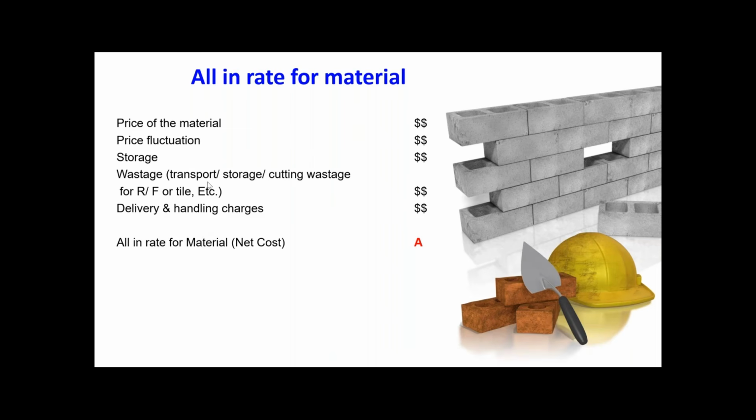So do you understand? Maybe you are paying the tax, okay, that should be included within that one. If you are paying any other cost to obtain the material, all of that. You are paying for shipping, say transport, right? You are going for a delivery, which is like a transport. So if you are paying for a delivery, then you have to add all the cost to obtain the material.